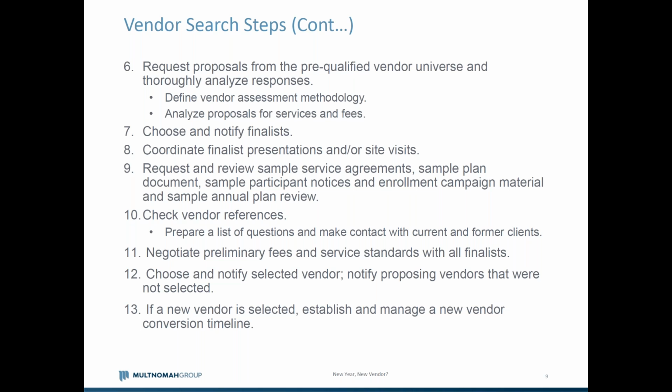Most commonly, we see that three finalists are chosen, but in some cases, it could be more than that, depending on how close the responses were and some of the incumbent activity in other situations, but three is a pretty common number. Then we coordinate the finalist presentations. Usually they're an hour to 90 minutes for each vendor. I think it makes sense to have them on the same day or back-to-back so that all the information is fresh in your mind.